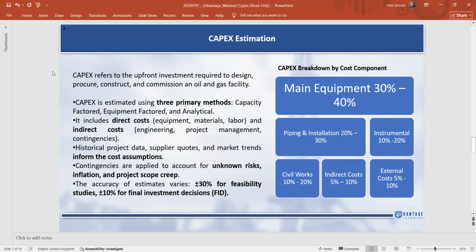Initially, for your capex, if it's a greenfield project, you don't know how the structure is. The big companies have a structure, they have a plan, they already have a lot of data, so they just use it as a template. They have data for X field, and they're going to use the same template for the new field. But the small companies, or maybe undeveloped countries, might go for a consultant or consulting agencies to help them design or plan this entire phase.